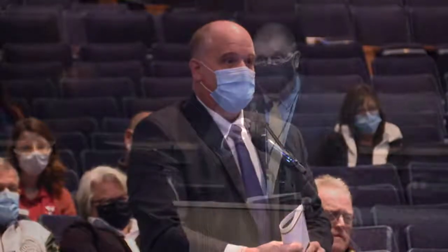Well, thank you, Mayor. As you know, we have done tabletop exercises and invited them there at the district. Right now, this is in just conceptual design. So we still have to vet it through schematic design, design development, and then construction documents. And through that whole process, we will be involving the experts, whether it's faculty members that teach in a particular area, or outside agencies such as the fire department to weigh in on that.